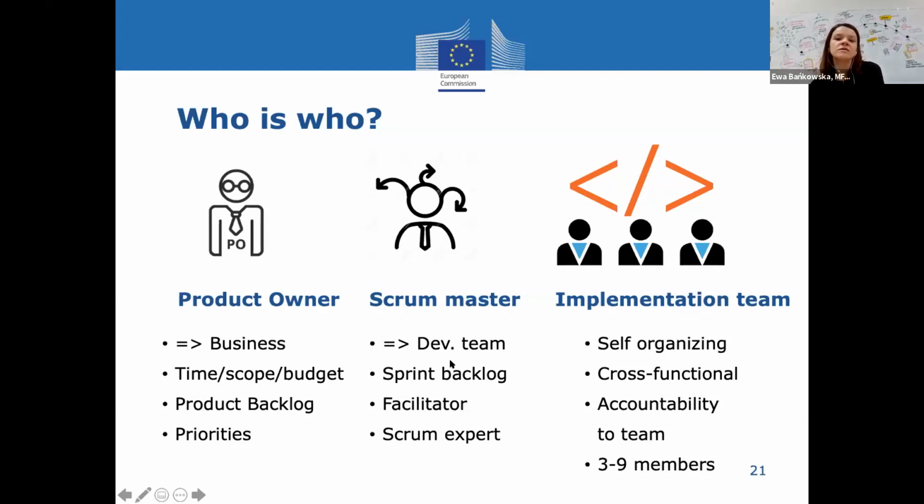Jente, there is a question. About the Scrum Master, is this person actually purely technical, or does the person need to command a certain authority, meaning have certain seniority in the organization? In Scrum, and I think more in general in Agile, we don't like to put a lot of hierarchy. So they don't see it as someone who's on top of the implementation team. What I see in development teams, it's often a developer, but it doesn't need to be the most senior developer. Maybe it's a young developer who has good project management skills, who has good planning skills, and maybe you have a senior developer that is very specialized in one thing, but is not that good at being a facilitator. So everybody has their strengths, and he is not seen as a supervisor of the implementing team, not at all, but he has the skills to be the facilitator and to help, to bring people together and discuss things in a participatory way.